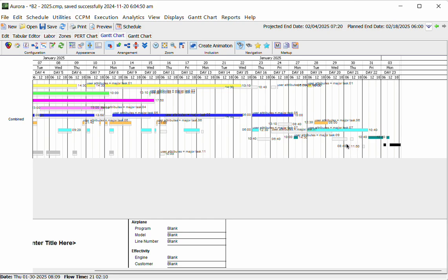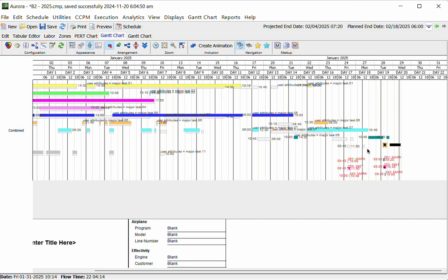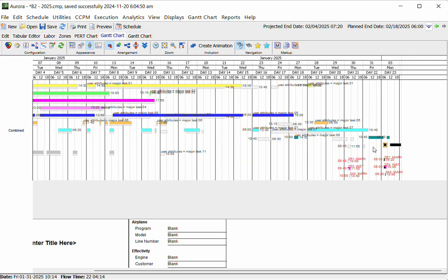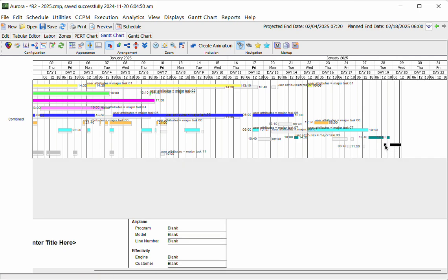Okay, so the way the summary comparison works is this sort of grayish rectangles show the previous version of the schedule, and the more intensely colored rectangles show the current version of the schedule. So from this, you can see that out of the 1 week delay, I basically lost just shy of 2 days. So I previously finished here on Monday, and now I'm finishing a little earlier in the day on Wednesday, but considering that I lost 5 full work days, that's not too bad.